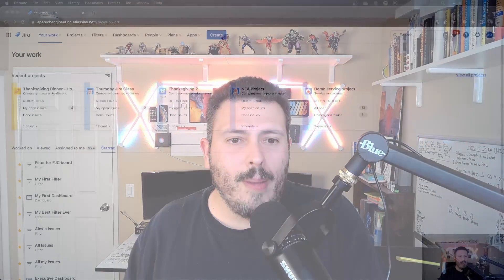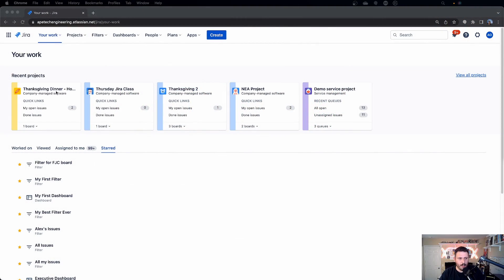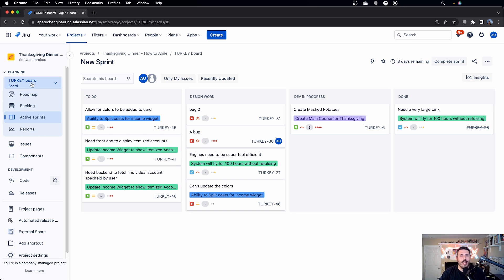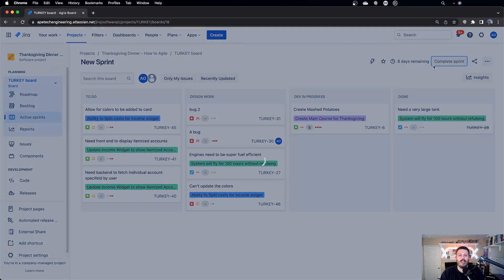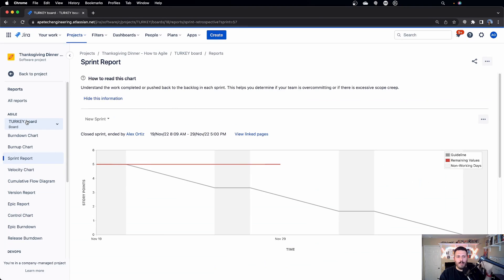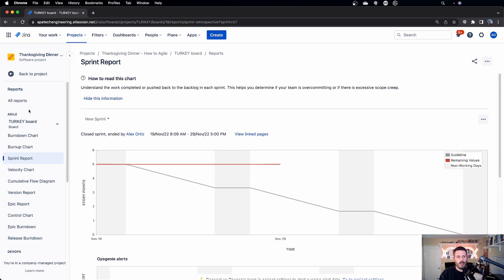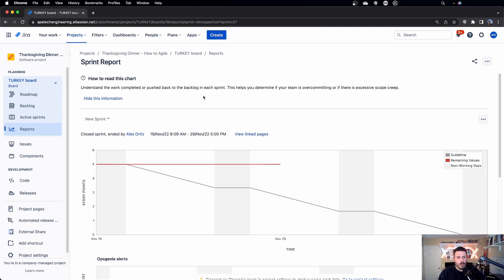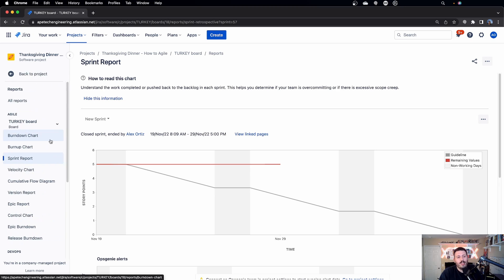You only get the burndown report if you are in a scrum-based project, so we're going to try to address those first. If you go to a company-managed software project, you're going to have reports regardless of your board type. So if you have either the scrum, where you have the backlog and the active sprints, or if you have a kanban, where you don't necessarily have a scrum, but you're still going to have reports. So anyways, I'm going to essentially close the sprint here, just so you can kind of see what happens. I'm just going to complete the sprint here. This automatically takes us to the reports. So you can either get to the reports by closing an active sprint, which is customary for you to do at the end of the sprint, or you can actually just click on reports, and it's going to take you to the reports.